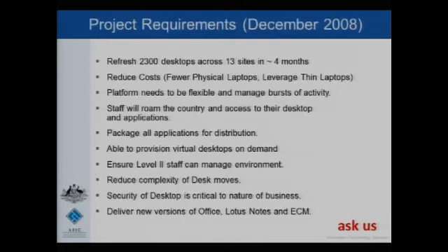You may also note I talk about virtualising 3,000 desktops, yet we've got 2,300 staff. Similar to the way server virtualisation has an enemy called sprawl, it happens just as much in the virtual desktop world. So if you're going to embark upon a project and you think you need 500 licenses, you might end up with 1,000 desktops. It's just the nature of it: once people realise how quickly it takes to get a desktop and get access to it, the sprawl just occurs. So we've got about 3,000, probably moving towards 3,100 desktops.